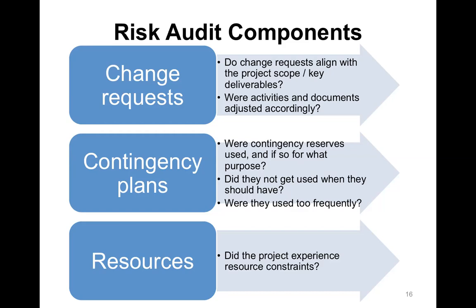So if you have many changes in a project with no change requests, then obviously you didn't follow the plan and procedures, which is a major problem. And vice versa. If you have change requests that have been approved, but no changes were actually made, then again, you're not following proper integrated change control processes, which can create a lot of risks for the project. So the risk auditor would be looking for change requests and seeing how they align with the reality of what happened to the project.